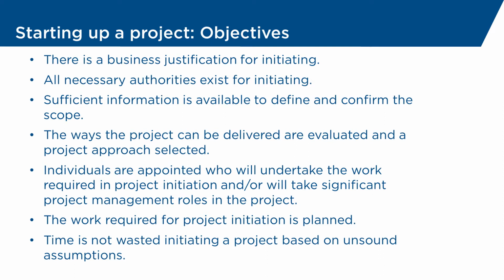We need to consider how the project's going to be delivered. We're going to have to consider the project approach, make or buy, bespoke or off the shelf. Is it internal development, external development? From this, we should then have a better understanding of who we need to be able to carry out the work. Those specialist resources that we'll need, are they available?